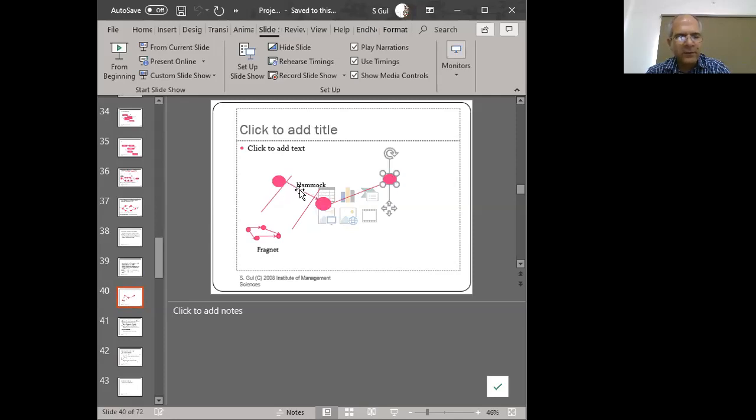And we can press some magical minus button and hide all the other activities, the minor activities that happen between these two. So we can simplify our diagrams and look at them at a higher level of abstraction. Then we can open up our diagrams and look at them at a lower level of abstraction, right? So if our diagram is hiding information, this arrowhead here is then a hammock activity because it's hiding a lot of info. And if we could expand that, we'll find that there's another minor network diagram hidden in here.